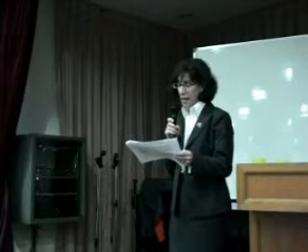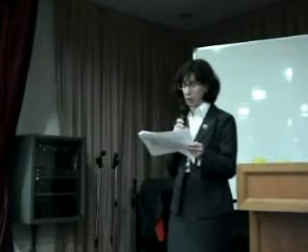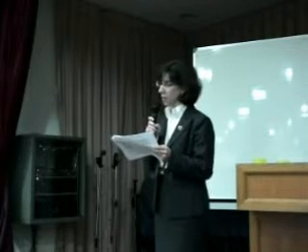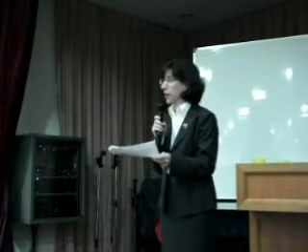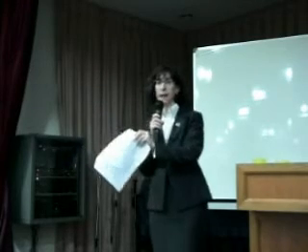Right, well, because you're saying, gee, the actual amount of time it's going to take them to get the bids and determine the pricing is only 5 days and 2 days and 5 days, but the reality is that when they go to get bids, it's going to take them 30 days. Yeah, exactly. They're going to start it in this iteration. This is exactly what we do in our regular project planning. You have to start it sometime. You're not going to get it done in one sprint or in one iteration. So you start it here and you finish it, and you know you're not going to know until the next time. Okay, that's great. This is kind of what I was expecting.